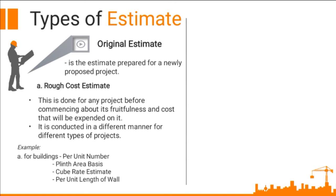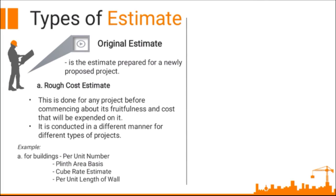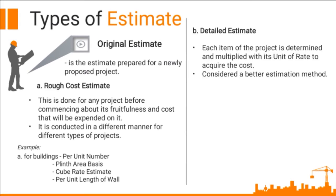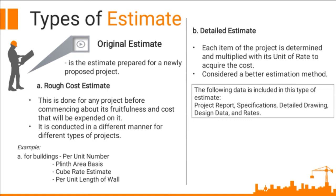Foundation includes the cost of damp roof course — the barrier designed to prevent moisture rising through the structure — and the cost of digging, filling, etc. The superstructure includes cost of masonry, woodcrafting, roofing, and finishing, etc. Detailed Estimate: each item of the project is determined and multiplied with its unit of rate to acquire the cost. Considered a better estimation method, the following data is included: the project report, specifications, detailed drawing, design data, and rates.